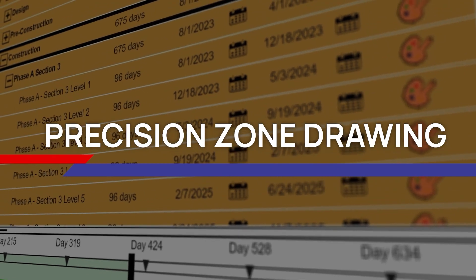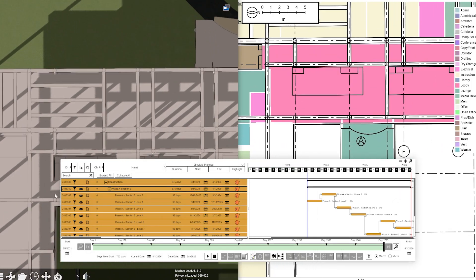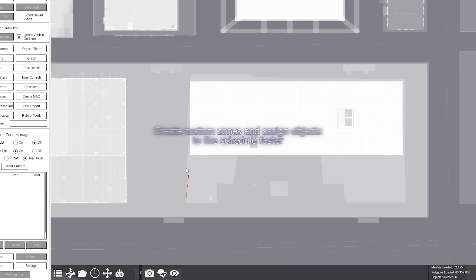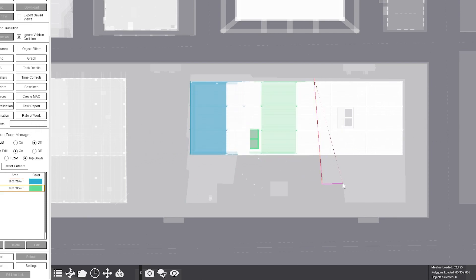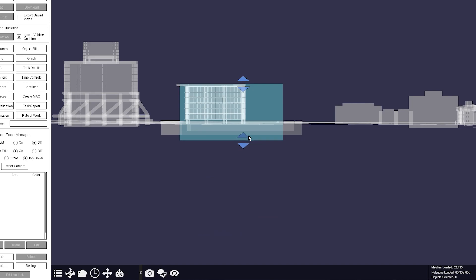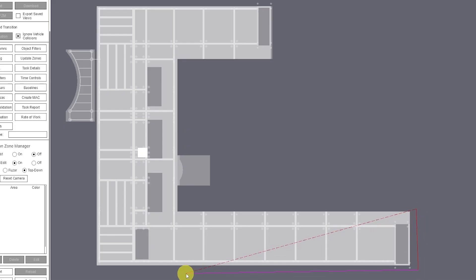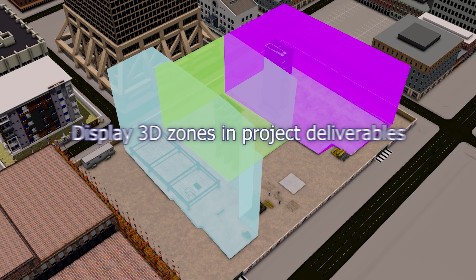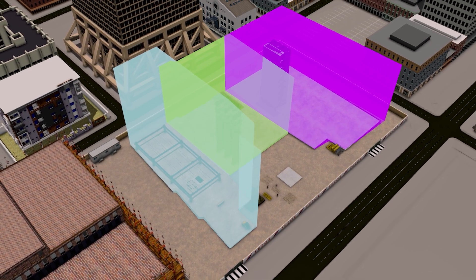4D object assignment can be difficult, especially when sections and areas in the schedule are not in the BIM parameters of the model. In Fuser 2024, you can now draw precise zones and adjust zone heights in a user-friendly way. Leverage zones to add model elements to the schedule and even display 3D zones for your project delivery.